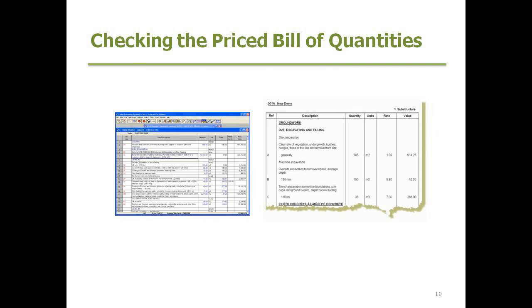A part of the evaluation process is still looking at the bills of quantities. If it's a project where there is a bill of quantities, or at least there's a schedule of rates, a scope of works, that form of schedule that you can compare apples with each contractor, with each supplier, with each subcontractor. And this is an extremely important part of the process. From this, you can pick up items which some contractors and suppliers have missed, and some of those items being missed, or maybe they've been included, excluded.